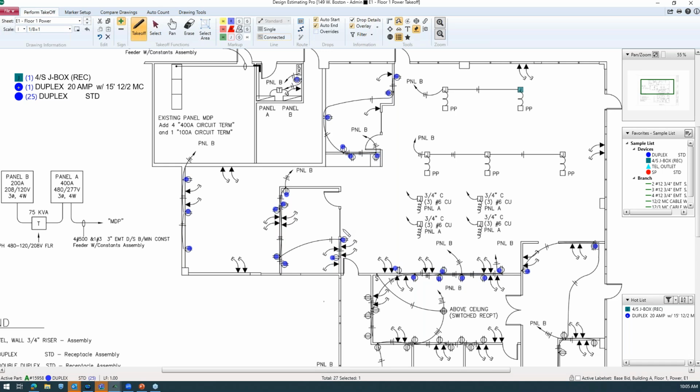When we take this approach, we now have to go in and run our intermediaries, our branch circuits from box to box, let's say. There's a way to do this without having to run all those individually. So what you can do is set up an assembly in the database that has a linear tied to it. Basically what we're doing is combining two assemblies.